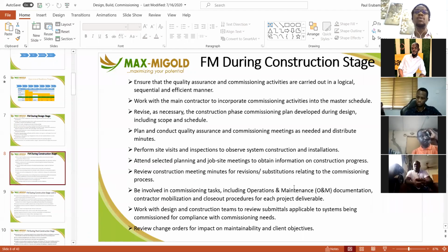Okay. And then during this process, ensure that the operations and maintenance documentation is taking place. During construction, when they bring all this heavy equipment to sites where builds are being generated, those are opportunities for you to start picking up assets with asset data. At least if you are not the one doing it, ensure that someone in the contractor's team is putting together a set of data according to a template that you provide.